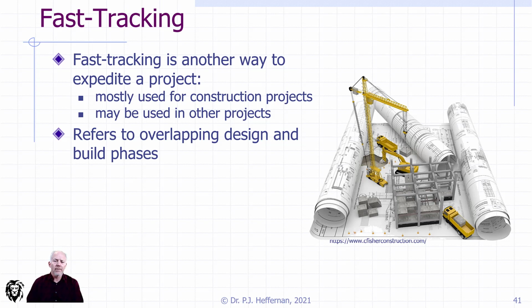I actually think of fast tracking a little bit more fundamentally, in that you probably establish a series of decisions around what is normal. And normally we don't want to work a whole lot of overtime. That costs money. We don't normally want to hire additional labor, and that type of thing. But if you want to fast track, you say, okay, different set of decisions, and you move to a different column that says, okay, overtime is authorized within X number of hours, we can do this, we can do that.